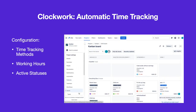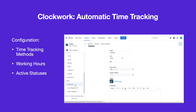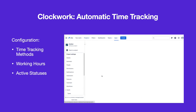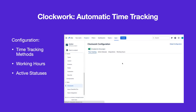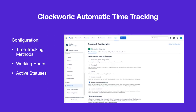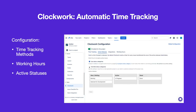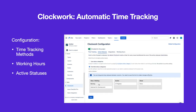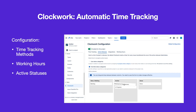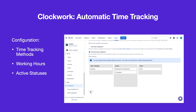To configure active statuses for the project, navigate to Project Settings > Apps > Clockwork and select the Active Status tab. Click Override Status Categories and drag the appropriate statuses into the active column. Click Save.